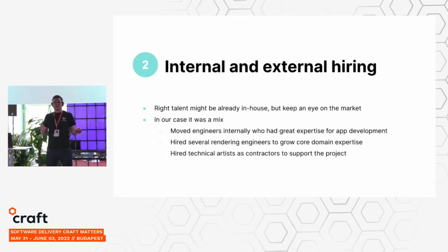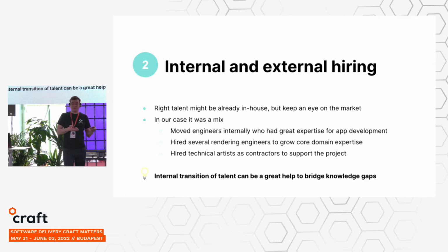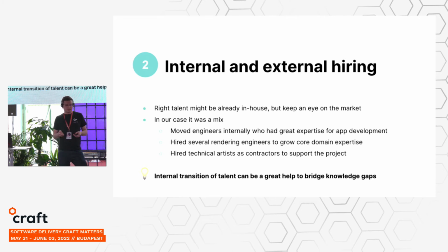And also, in order to deliver such amount of content to the feature, you need to have some sort of technical artist who can create that content for you. And you need to think about how to give them work after this feature has been done. So actually, we ended up hiring them as contractors. So we can very finely tune how much they're working for us and how much input we have from them, depending on our needs. So to summarize, internal transition of talent can be a very great help to bridging the knowledge gaps in the team, but also you cannot avoid the external hiring.